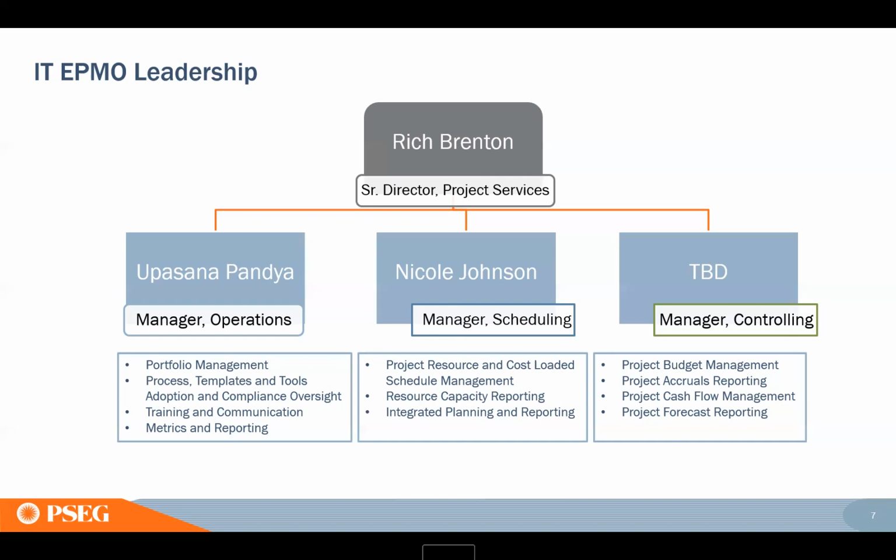A TMO is a transformation management office, meaning I have just this one big transformation that has a finite start and end, that has so many projects and so many programs underneath that it's going to require next level reporting, next level management. So you take those from your portfolio and treat them as kind of a special group that also follows what is put in place by your PMO, but just has additional requirements that generally your regular IT projects will not have.